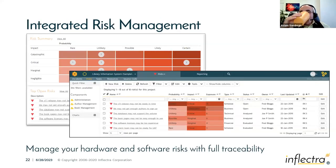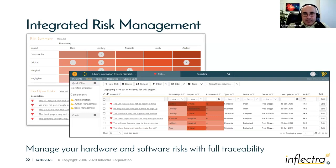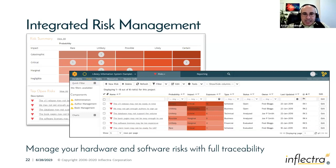SpiraPlan includes integrated risk management. You can manage risks by probability and impact, and Spira calculates the exposure of each risk. You can use those risks to derive requirements and tests, mapping requirements to risks to do risk-based testing — the system can tell you which test cases will reduce the maximum amount of risk exposure, allowing you to prioritize testing based on risk. For hardware or manufacturing, we also support FMEA-level risk management, adding a detectability factor to give you a Risk Priority Number (probability × impact × detectability).